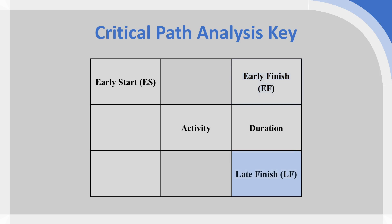On the bottom right we have the late finish, which is the latest the activity can finish without delaying the project as a whole — we'll discuss how we calculate this on a reverse pass. On the bottom left we have the late start, which is the latest the activity can start without delaying the project. In the middle-left square we have the slack, which is the number of days the activity can be delayed without causing an overall project delay.